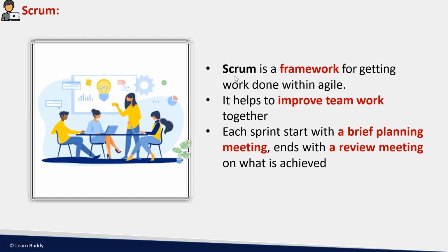In the agile methodology, if any company is following it, there is one person called the scrum master. His role is to check whether all the team members have enough work or not. If the team has any blocker, for example, I am developing some application code and I got stuck somewhere, I don't know how to write the code, I don't have sufficient information. In that case you go to the scrum master and update him that you don't have sufficient information to write the logic or design the screen, and he makes a note and interacts with the clients to get enough information for you.